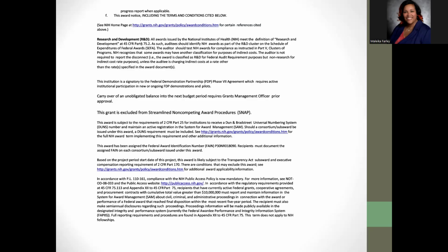As part of your progress report, you do not need to include a budget. If it's not SNAP, it's due on the 1st of the month prior to the end of your budget period. So if it ends on June 30th, your progress report is due on May 1st. And you do have to submit a detailed budget and justification as part of the progress report. So those are the key differences for SNAP versus non-SNAP. That's the most relevant thing in this section that I look for. There's other terms and conditions there, but that's what's most important to me when I'm looking at that section.